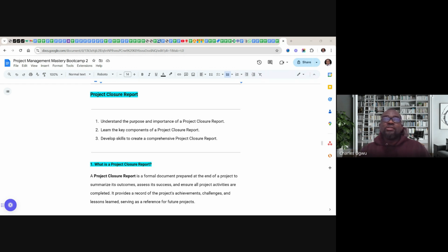These are various names. In Agile, when we talk about definition of done, we must look at the acceptance criteria. Have we met the acceptance criteria? For a particular user story to reach a definition of done, it must have satisfied the acceptance criteria through testing. But if you are using a general project management approach, I will call it success factor.